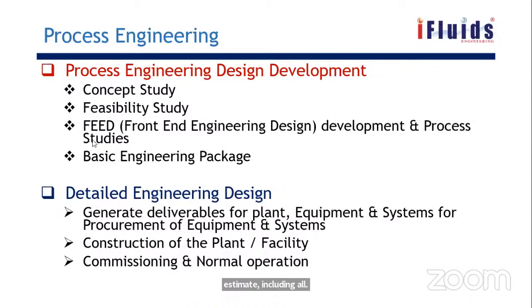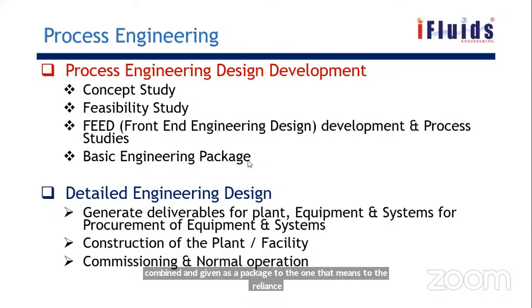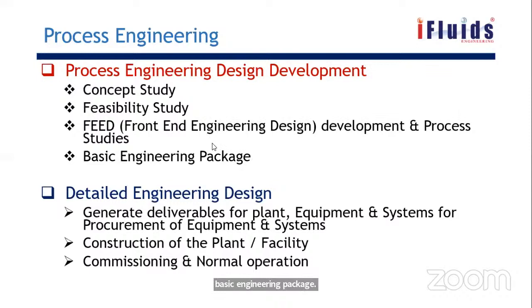So the front-end engineering design, which is called FEED, and then the basic engineering, both will be combined and given as a package to the owner, that means to Reliance. The basic engineering package will have additional documents along with the FEED. Once Reliance agrees, okay, we can go for 50,000 crore, we can go for putting this refinery there, then this basic engineering and FEED package will be given to a detail engineering company.